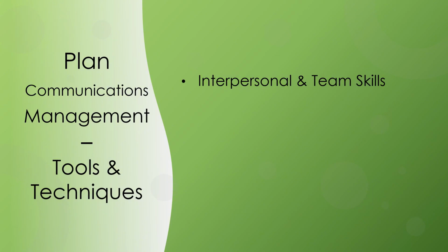Interpersonal and team skills. Interpersonal and team skills that can be used for this process include communication styles assessment, a technique used to assess communication styles and identify the preferred communication method, format, and content for planned communication activities. Often used with unsupportive stakeholders, this assessment may follow a stakeholder engagement assessment to identify gaps in stakeholder engagement that require additional tailored communication activities and artifacts.